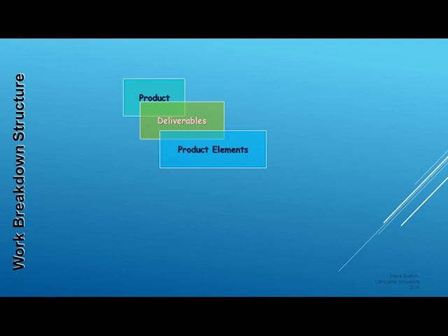For example, for the motor car, a product element could be the detailed design drawings for the engine. These drawings will contribute to the manufacture of the car itself and will form the basis of the service and repair facility product and associated deliverables. Product elements can form the building blocks of the project and directly lead to identification of the work needed to complete them.